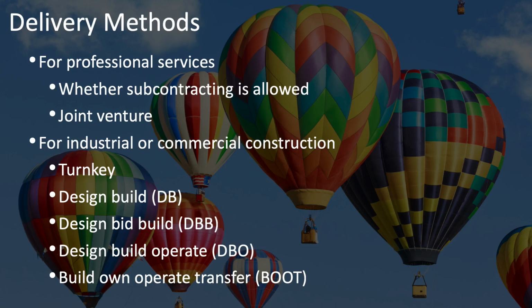Next, we have design, build, operate. This is when the client or the buyer retains ownership, and this is most often used in public-private partnerships to build things like toll roads or power plants or water systems. In this case, the buyer continues to own whatever is built, but then the vendor who builds it operates it for a number of years and benefits from this operation and receives some sort of commission or percentage of the income from these different facilities.